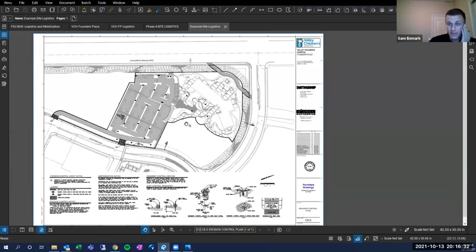First off, if you're going to be using a page from the drawings, you want to make sure you use a page that encapsulates everything you need, while also being simple enough to not include a bunch of information that won't make sense on a logistics plan. I combed through my set of drawings, and there was really one that was good, that didn't have a lot of information but showed the whole project scope. That happened to be the erosion control or SWPPP plan.